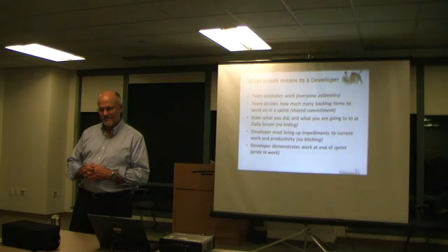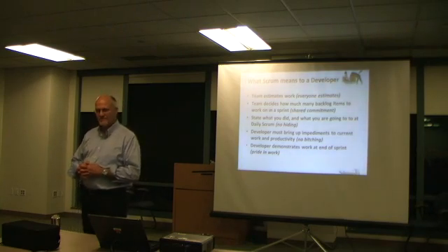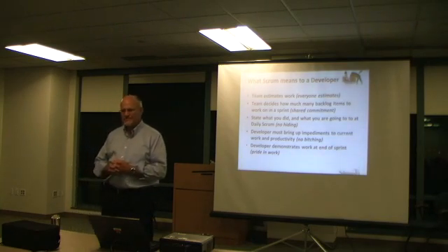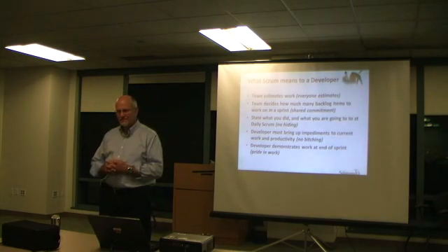After a couple of days, I actually went to the project leader and said, I'm losing information. Because if I'm working on the UI and you're working on the database, most days, I'm going to say a little bit about what I did, you're going to say a little bit about what you did. We're probably not going to say anything that directly impacts each other, but once in a while we will. Once in a while you say, oh yeah, I'm working on the database and I'm going to remove these fields, and I go, wait a minute, I was depending on those to be there.